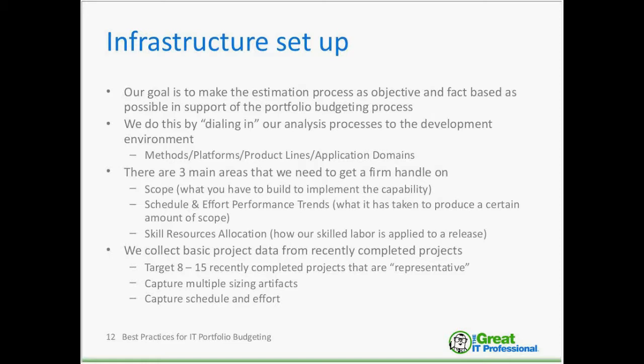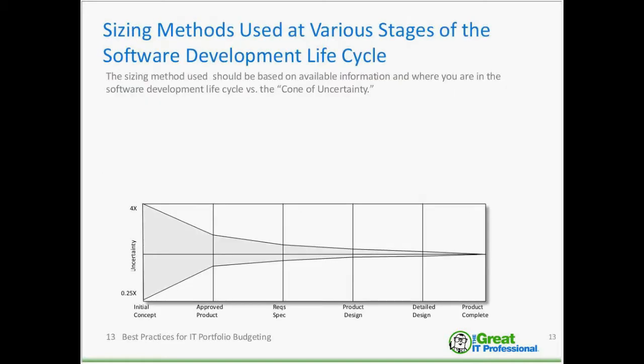Since we're going to be talking about a scope-based estimation process as being the pillar that we're going to use for this IT portfolio budgeting, I thought it would be useful to spend a few minutes and talk about scope. I like to start the discussion about size and scope with what scope is not. A lot of people think of size and scope in terms of effort. For our context today, we're going to think of size and scope in terms of the capabilities and functionality that need to be defined, designed, built, tested, and delivered to the customer. So it's really the functional content of what we have to build to satisfy the customer's requirements.